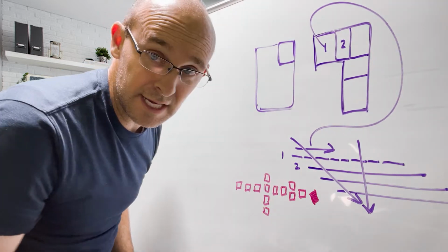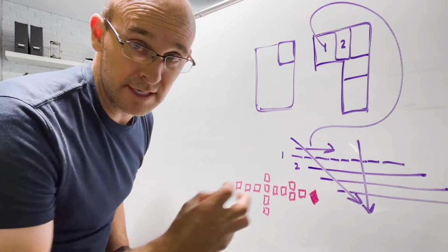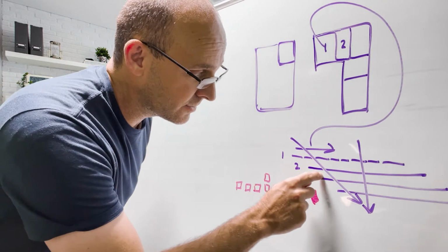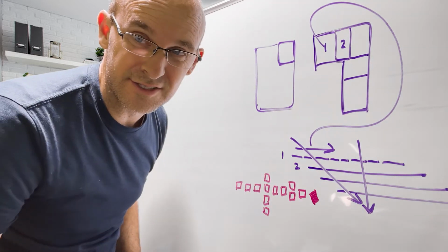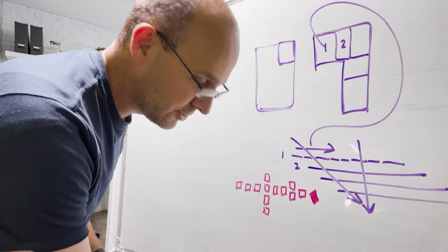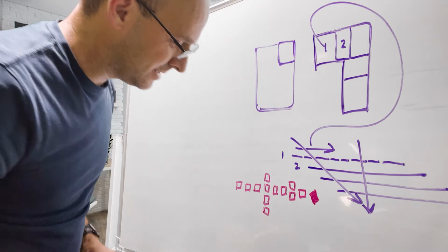So really all a takt plan is the stacking or the combination of pull plans together to see not only workflow, but trade flow and design and logistical flow. Fantastic stuff.